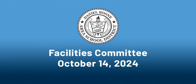I got 4 quotes from 4 local vendors, with my cheapest quote being $13,000. My highest quote was $17,695. And you have the specs here. They're all spec'd out for the same water heater.